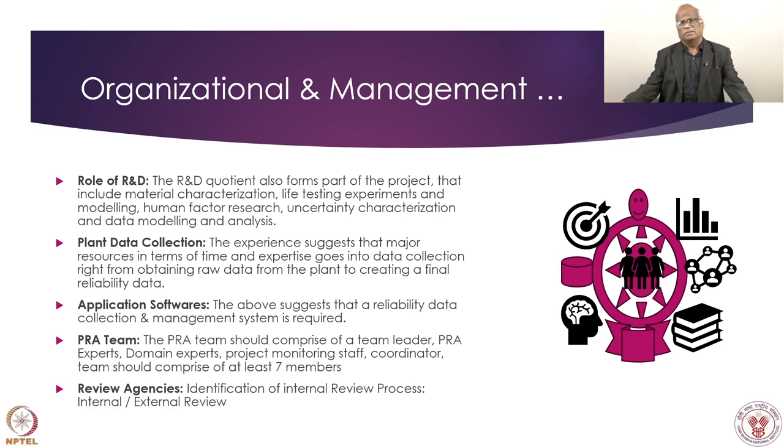This is plant data collection in a PRA project. If it is for the operating plant, the plant specific data should be used to the extent possible, because as I mentioned, it should reflect an as built, as operated plant PRA. And again, my experience is that data collection and analysis, and finally translating them into useful input for our PRA, takes 50 to 70% of the resources, because only the quality of data can ensure a quality output.